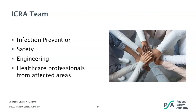Now we'll talk about the ICRA team. It's important to ensure all the relevant parties participate. In addition to infection prevention, the ICRA team should include safety, engineering, and someone from the affected area or areas. The relationships within this team are invaluable. The most effective way to keep residents and staff safe is for everyone to be on board during the planning process. When good relationships exist within the team, better communication occurs when new projects pop up and more sharing of information takes place. I've learned more about construction regulations, HVAC systems, and plumbing than I ever thought I would — and the reverse is also true.